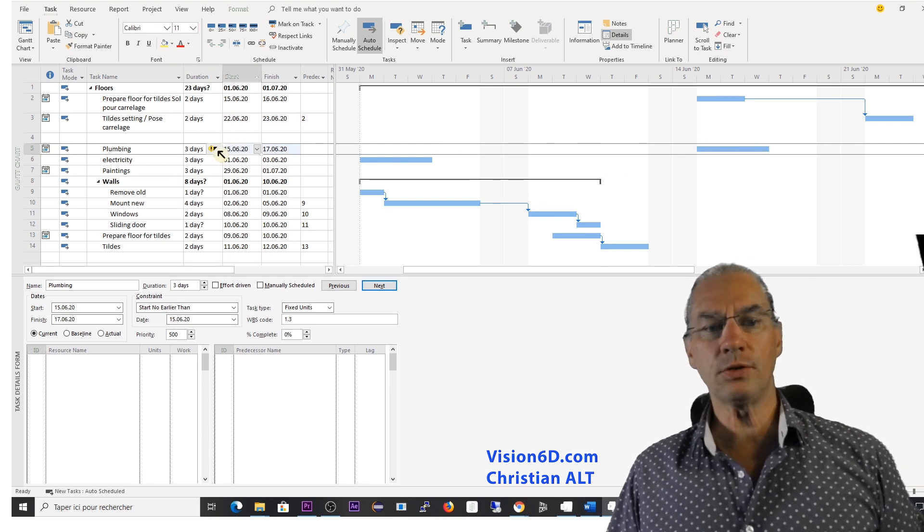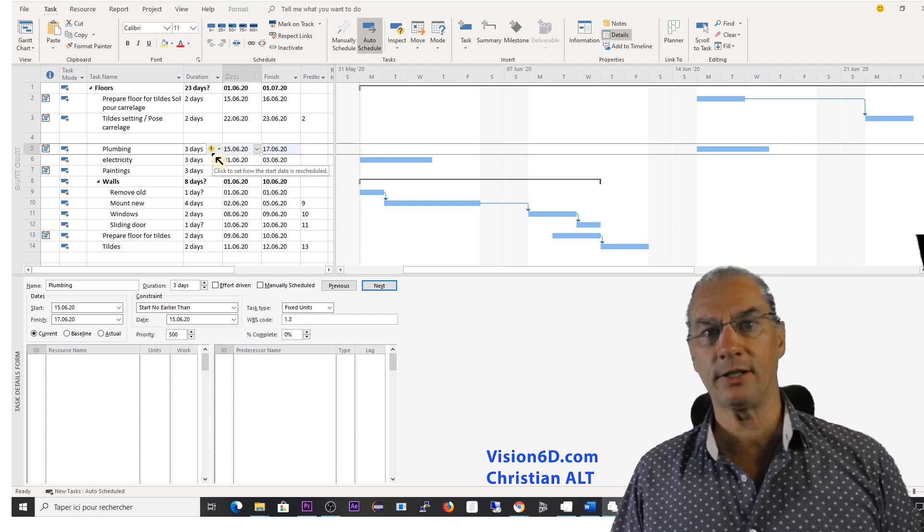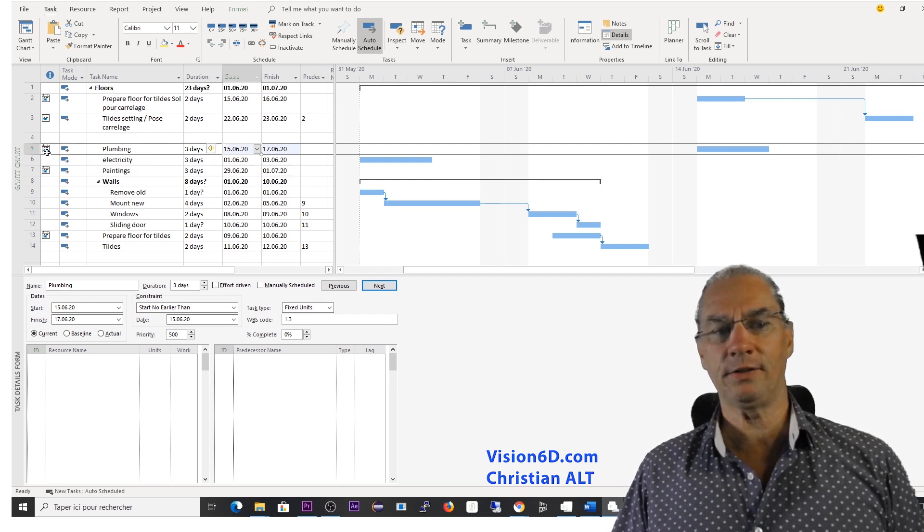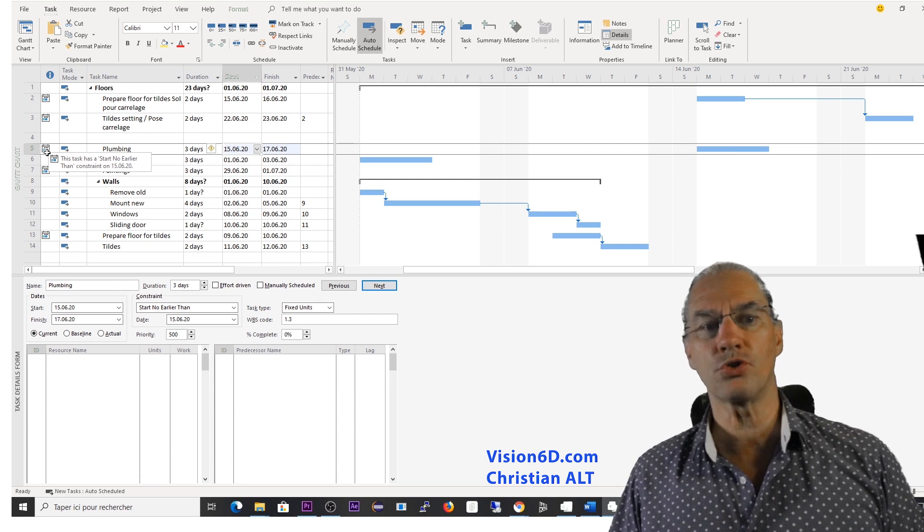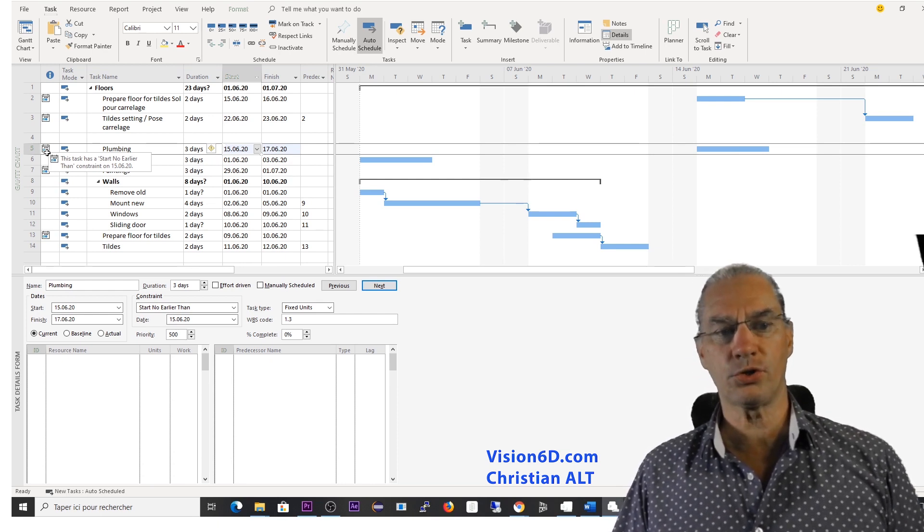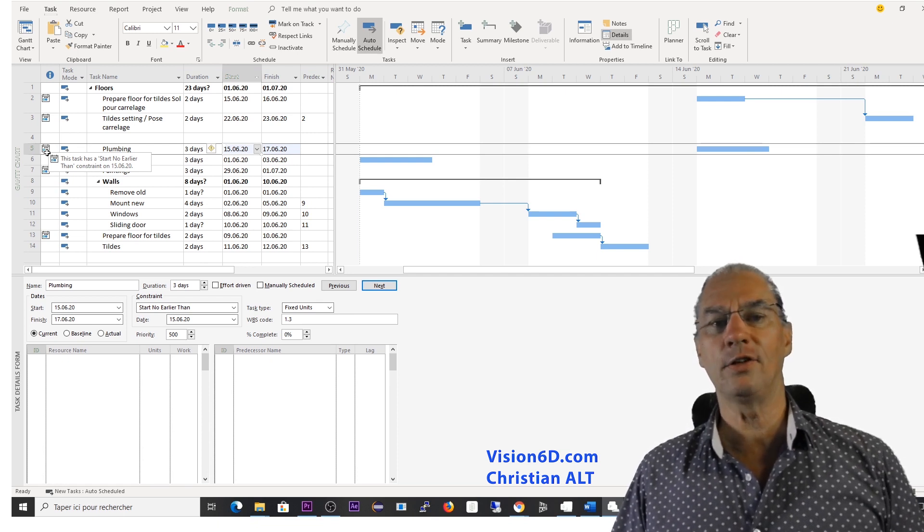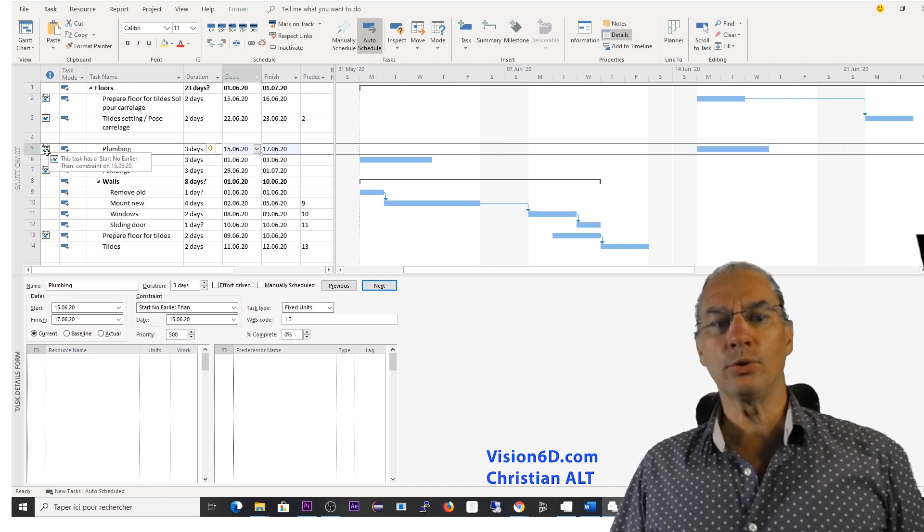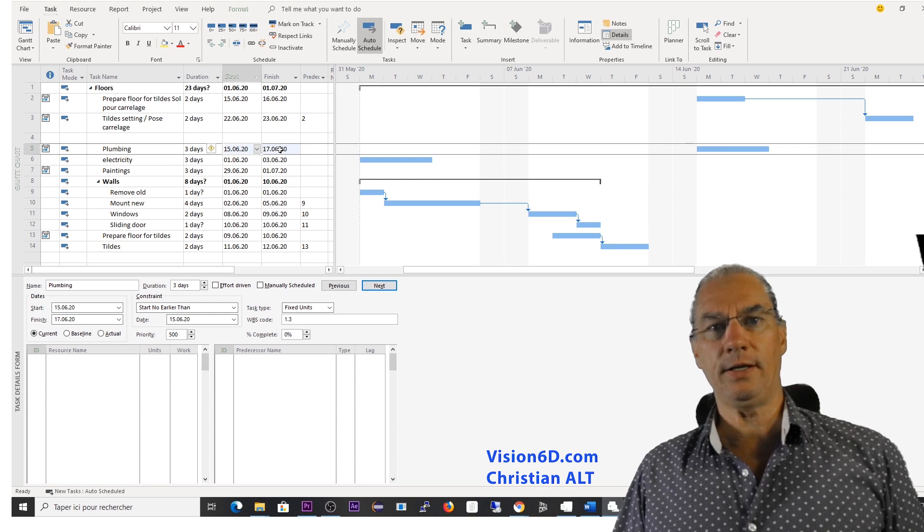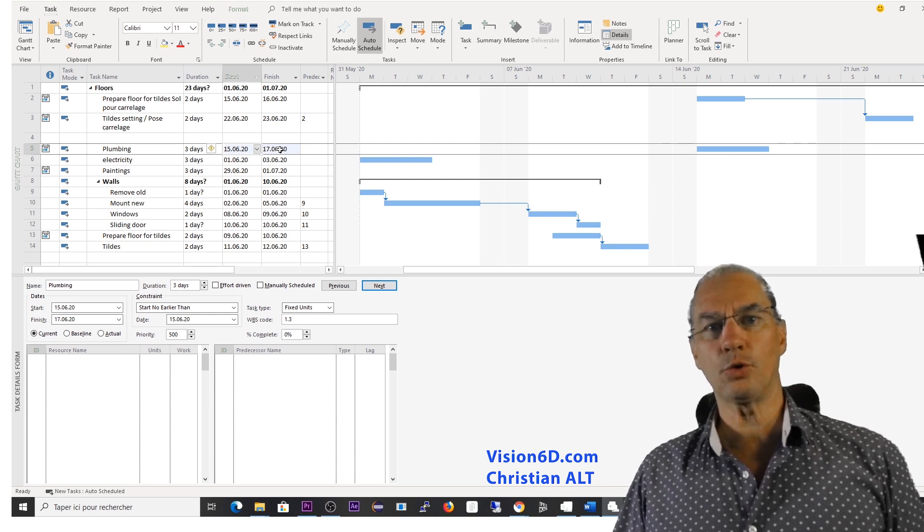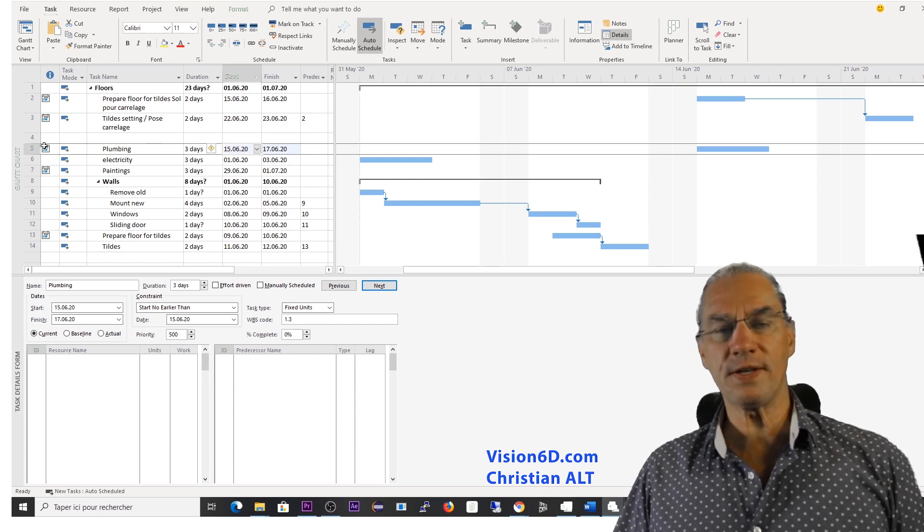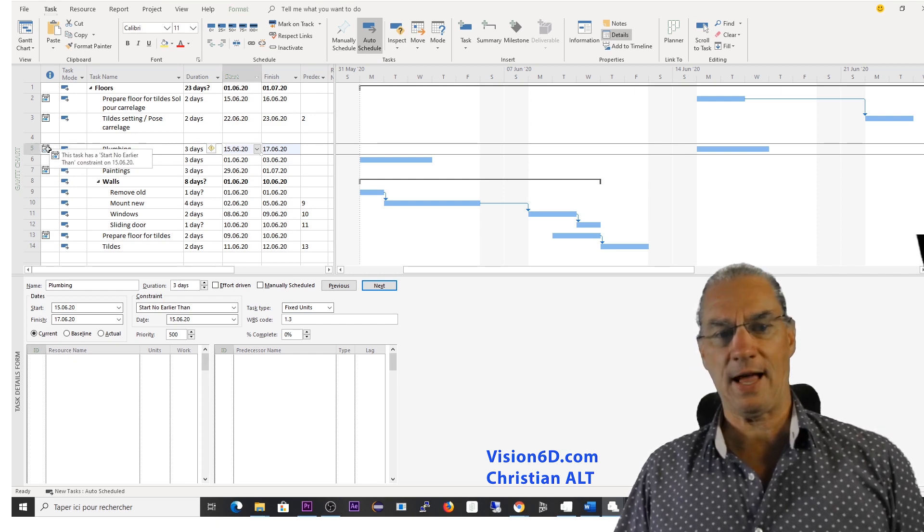What is interesting to notice, it's here we have an icon that is pulling our attention. I'll come back to it. And another new icon that says we have a constraint. So this is really strange, we have a constraint which is start no earlier than the 15th of June. This means that whenever we set a start date or a finish date, MS Project is interpreting this as a constraint. And it shows us that we have a time constraint by showing us this icon.